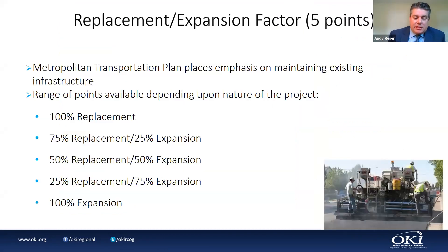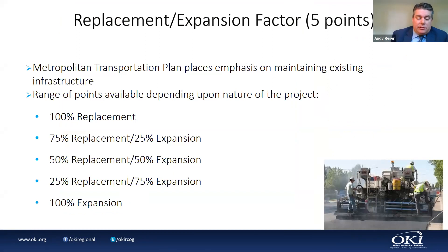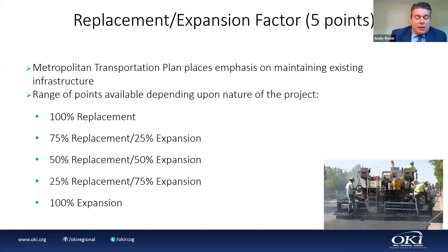The replacement/expansion factor gives preference to projects that invest in replacing rather than building new facilities, reflecting OKI's metropolitan transportation plan emphasis on investing in existing infrastructure before building new. The number of points is based on the percentage of replacement versus percentage of expansion associated with the project.